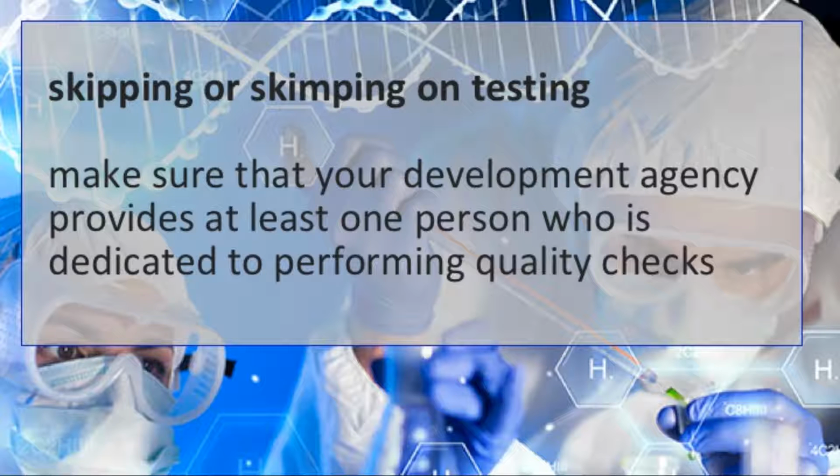And this is really important for clients to understand as well, because what often happens, just like with discovery, is that if an agency doesn't have a robust testing workflow, they're going to build something the way they know how with their developers, and then they're basically going to give it to you and say, you do the testing. That's generally a phase we call UAT, which is user acceptance testing, where we give it to you as a client and say, look it over, make sure you check everything.